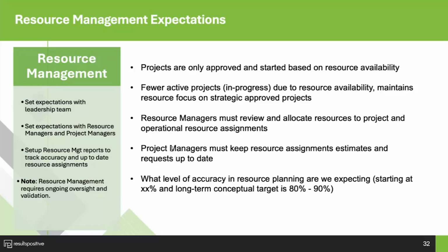Project managers must keep the resource assignment estimates up to date. And that's going to be key for them. Obviously, those are provided to them once the project is approved from a demand. But as we all know, there are scope changes throughout a project. So as part of that process, the project managers will need to work with the right resources to estimate those additional resource needs or reduce the resource needs. So it's important to spend the time to do that.